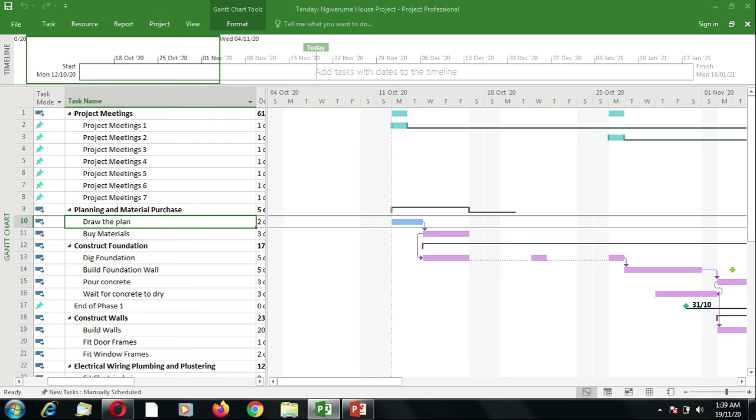But like we said, if you have got more than one person that needs the same change, then what you'd rather do is create a new base calendar and then adjust it to the conditions of that group that need that unique change. Then you simply assign that new base calendar to them.